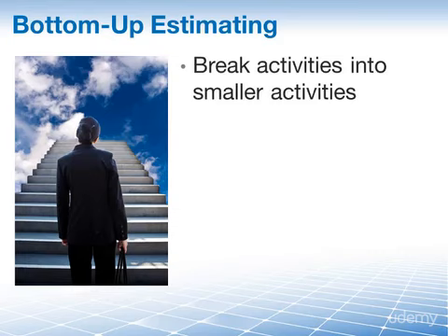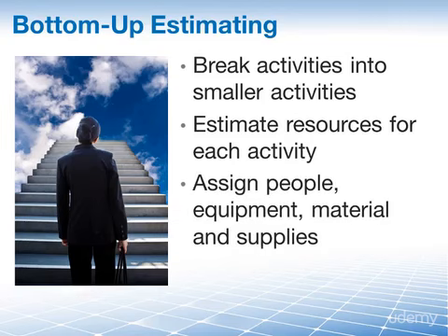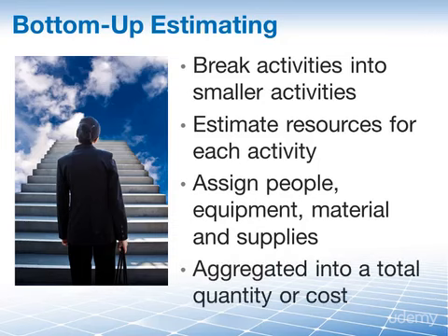In order for you to even begin to estimate the resources, you probably began breaking this enormous task down into smaller, more manageable tasks. And once they were small enough, you'd then be able to estimate the required resources for each schedule activity. Then you would assign people, equipment, material, and supplies to it, and then you can take all these estimates and add the numbers up.